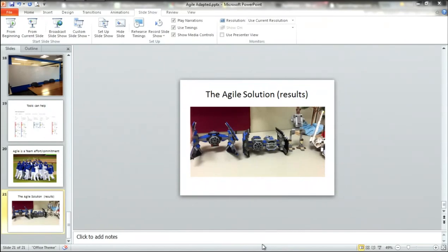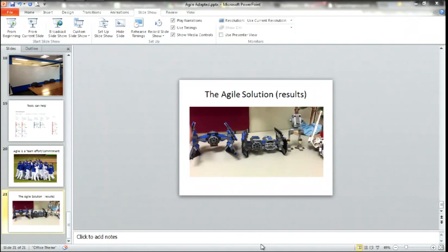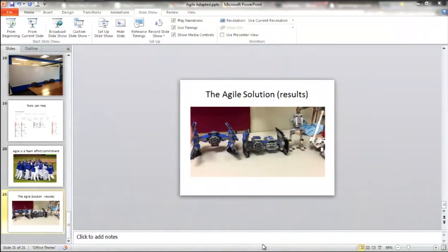However, you get to the point of the question: is it what you need in the release? And you go back to your business and say, we all committed to getting this set of stuff and this set of functionality done. If you want this new bell and whistle, what are we taking out of this?